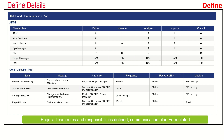The ARMI chart helps all stakeholders understand their roles and responsibilities in different phases of the project. A stands for Approver — who will approve the project. R stands for Resource — who is the SME in the project. M stands for Member — someone who helps in data collection and implementing solutions. I stands for Informed — senior stakeholders who are informed in certain phases but will not be approving all phases. The team also created a communication plan and followed it to finish the project on time.